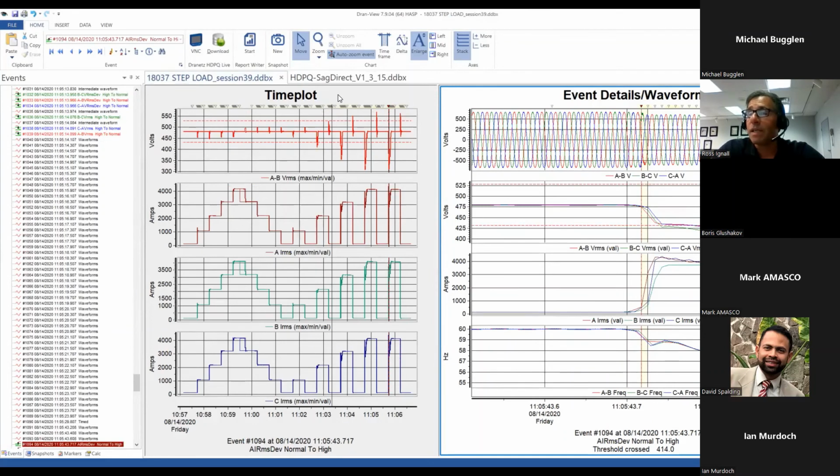Now, just to set this up, this is a real world commissioning test at a data center somewhere on the West Coast. I can't disclose any more. Typically when our users, technicians, owners or their service people are commissioning or testing data centers or mission critical or high reliability centers, they usually have UPS systems, backup generators, and of course the utility supply. So what they're doing is providing what are called impulse or transient tests.